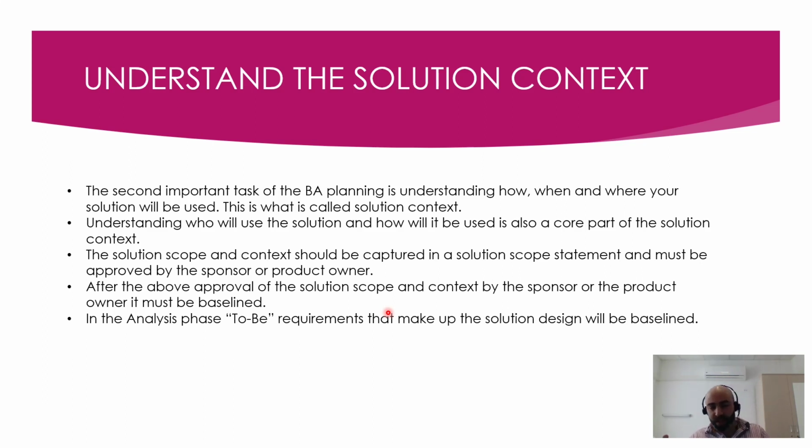It depends from one organization to the other. Some use a management of change control process. In the analysis phase, the to-be requirements that make up the solution will be baselined. So baselining the solution scope happens in planning, whereas baselining the to-be requirements happens in the analysis phase, the subsequent phase to business analysis planning.